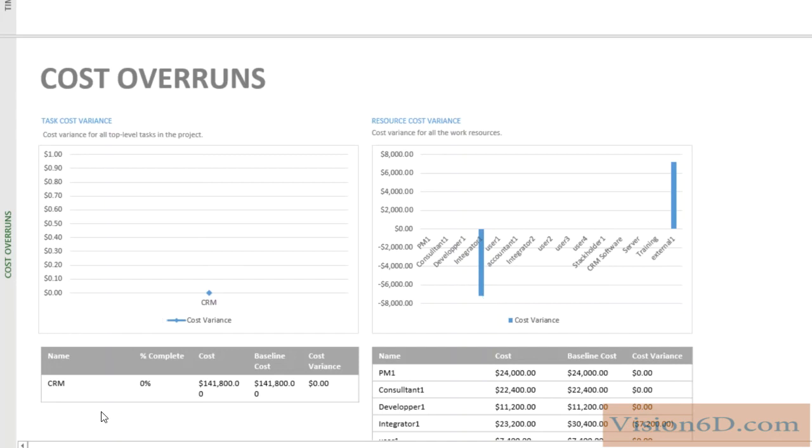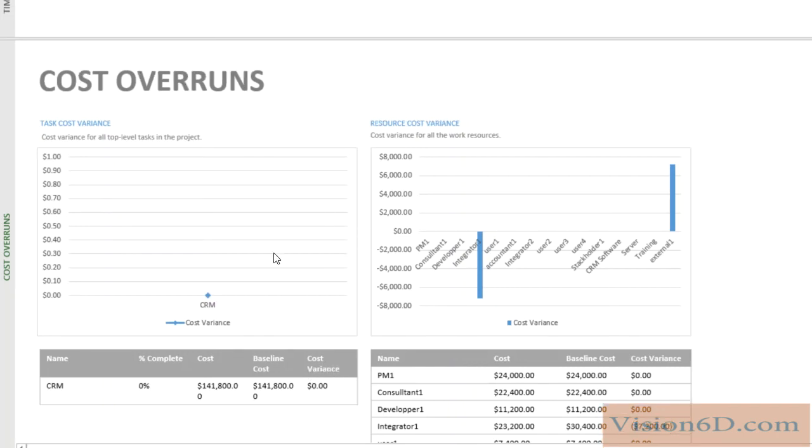So it means, and it's what we see here down, that we had a baseline that was costing 141,800, and that the actual cost is still 141,800. And you see that there is no cost variance. As you can see, the two approaches have differences in the consequences when there are changes. We've discussed this quite intensively with the participants to the training, so I let you choose the way you want to proceed. It might also be that your organization is already dealing in some way.